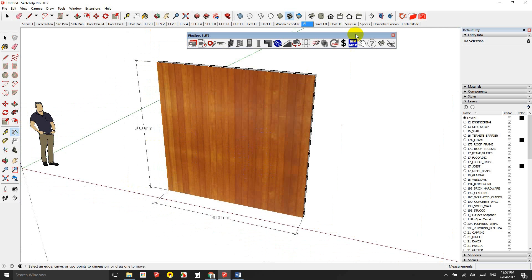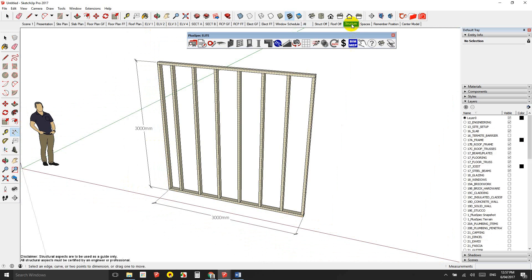And if we looked at the structure, we would have 1, 2, 3, 4, 5, 6, 7, 8 studs and two top plates. So I should have 10 pieces of timber there at three meters long or lumber.